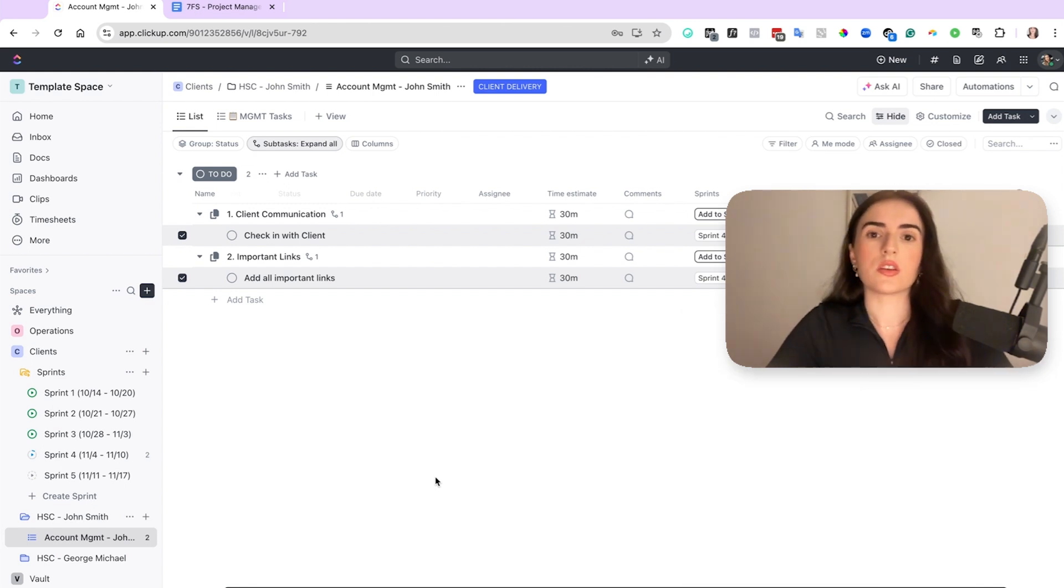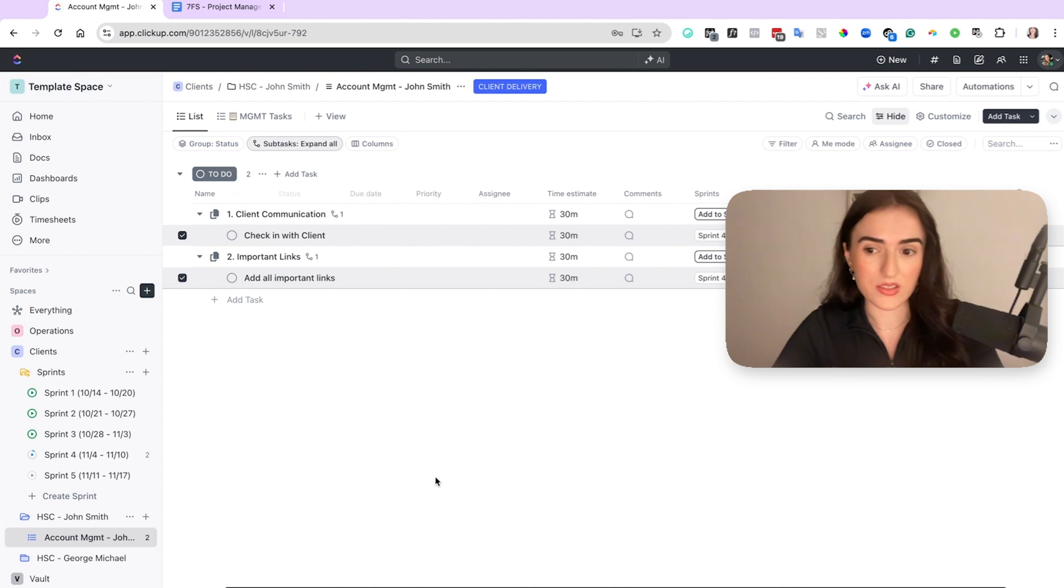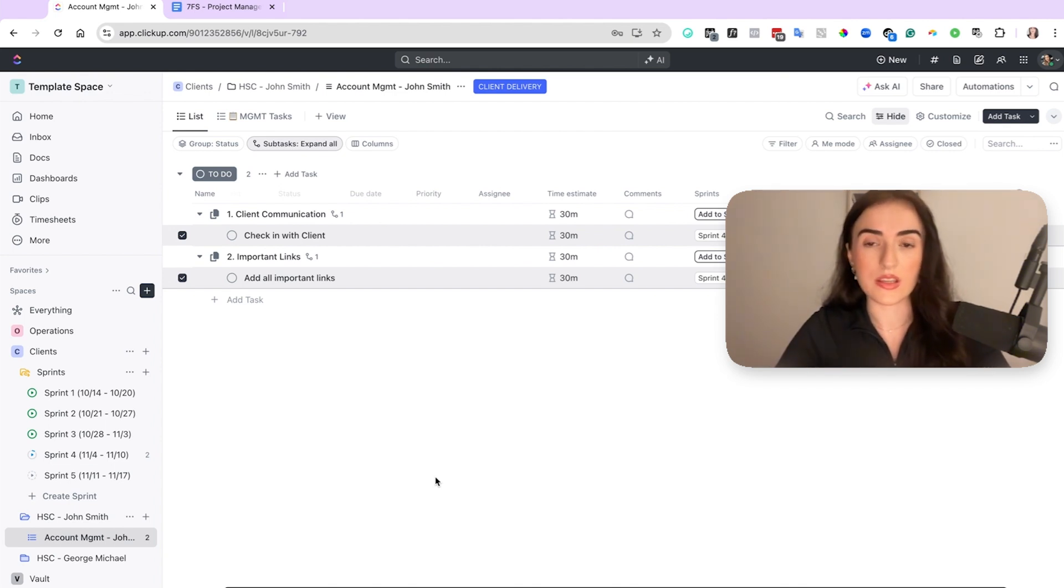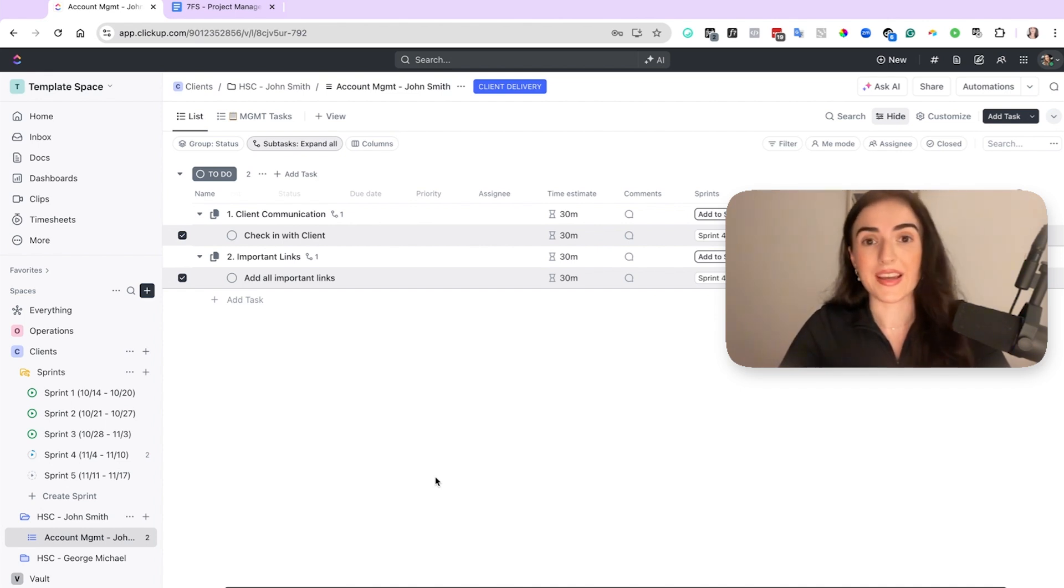Now, the idea here is that when you're adding tasks to sprints, it means that your team is going to commit to complete the tasks on this sprint. But if the due date is across multiple sprints, like two or three sprints, then that means you need to add the tasks on both sprints.